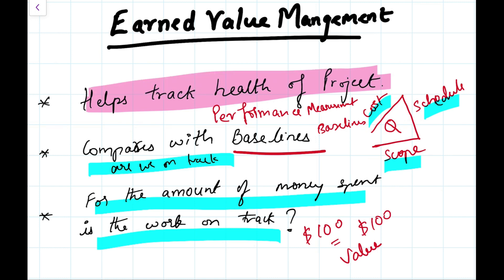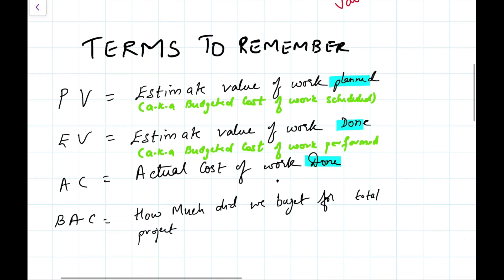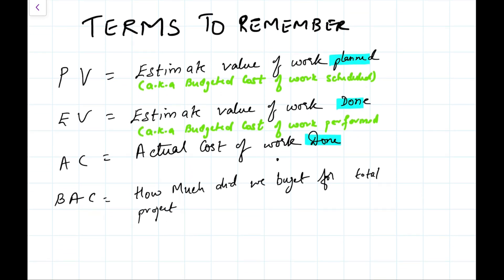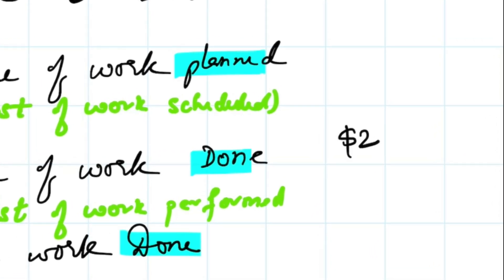There are some important terms you need to know for earned value management. PV is planned value, EV is earned value, AC is actual cost, and BAC is budget at completion. Planned value is the estimated value of the work planned — also known as the budgeted cost of work scheduled. For example, if you plan two days of work at $200, the planned value is $200. Earned value is the estimated value of the work actually done.